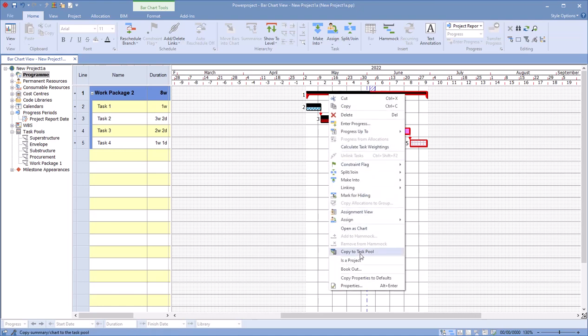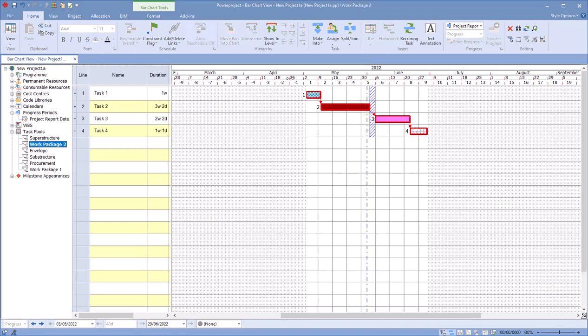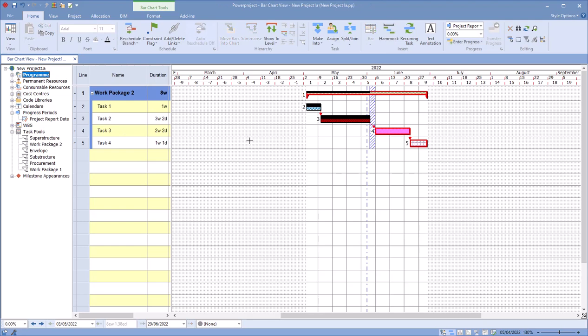It creates my Work Package 2, but when I select that, notice the progress has been removed. So no items inside a task pool can have progress.